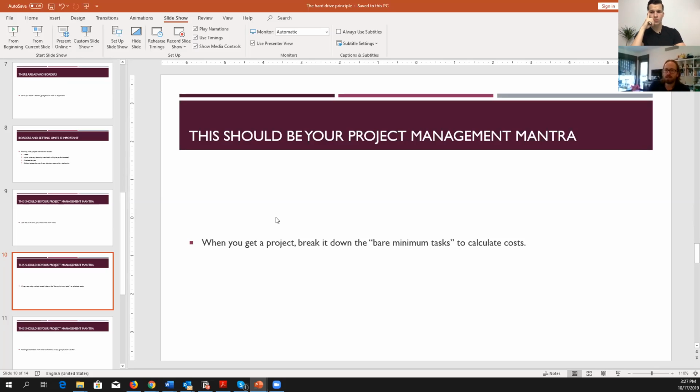It's just the first task of many tasks. Some people will say you have a task to create a logo. No, we call it a project. A logo is a project by definition. It's not a task. It's broken down to many tasks inside. Getting a vertical out of this sketch and creating several variations. Each one of them is a task, if not a project on its own.